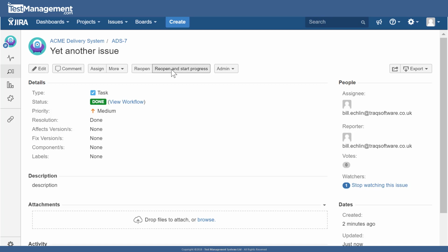So bear in mind there's a trade-off here. The simpler you make that workflow and the fewer status values, the easier it is to understand and work with Jira. But the trade-off there is that workflow and status value may not model your real world environment, and you may need to add status and workflow values.